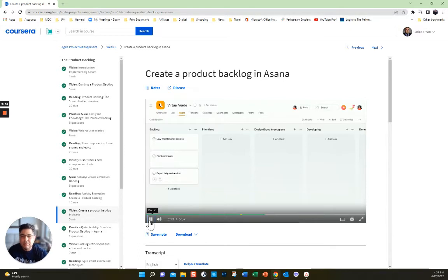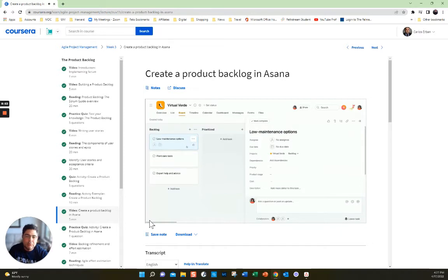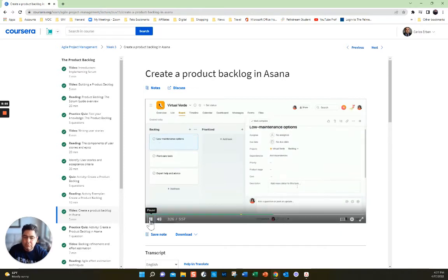Great, all set. Here's my completed list of user story titles. Next, I'm going to add the user stories. To do that, I'll need to open the task details pane and update the task description with the story. Remember, the story is the task from a consumer standpoint. So who is the user, what's the action, and what is the value or the purpose of it. Remember creating user stories in the last activity? I'll add in one of those as an example here under description.